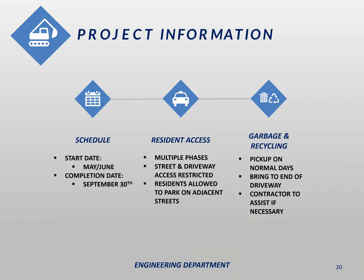The anticipated start date for this project would be sometime in May or June. We will likely hold a pre-construction conference in April, at which we'll get a schedule from the contractor and know approximately when they want to start. At that time, the City will send out notifications to all property owners along the project area. The final completion date is September 30th. That doesn't mean the entire project area will be under construction from May to the end of September — the contractor simply has that window of time to complete the project, which may be completed in phases, each with a specific amount of time allotted.